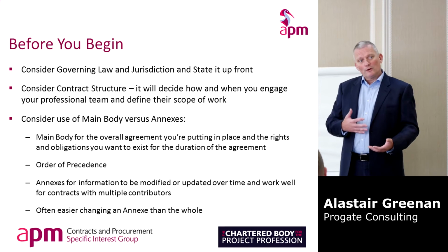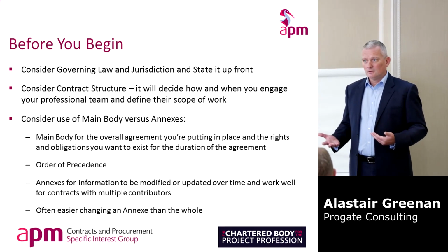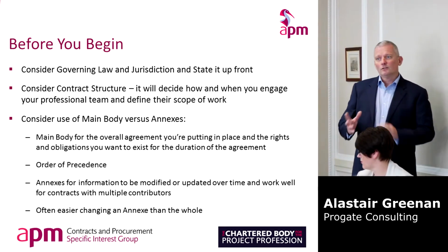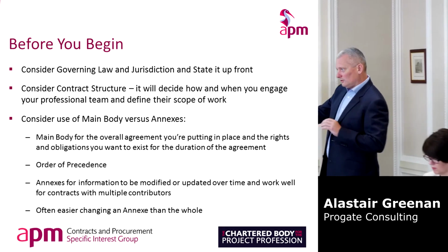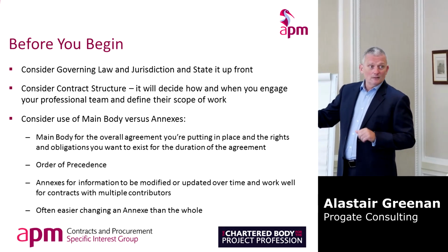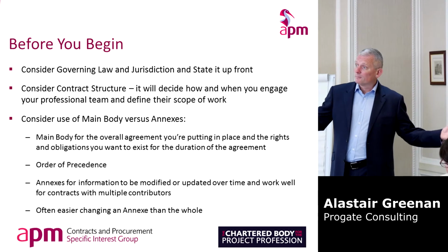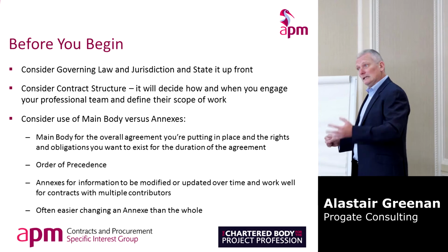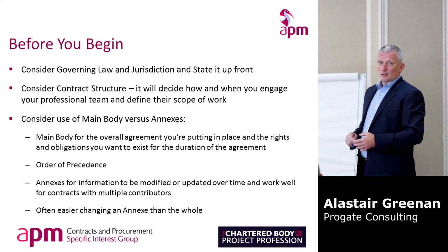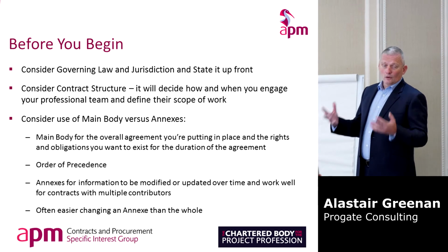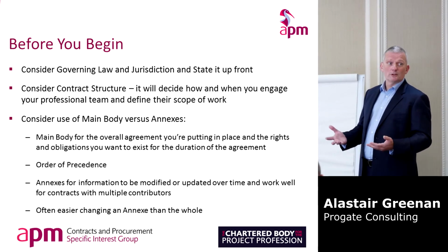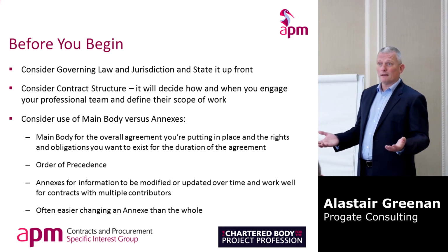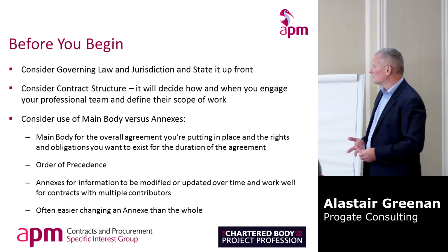Whereas other elements might need to be completely different. So payment mechanisms, if you're doing lump sum or reimbursable or some form of hybrid. So you just kind of want to think about what you can use as a boilerplate, and again, depending on what kind of contract you're doing, are you actually going to take a previous form and modify it or start from scratch? Previous form is cheaper because you're editing, and there's often less risk involved because it's been used and chewed and you know what works and what doesn't, but equally it might be a bad fit. So those are factors to consider as well.